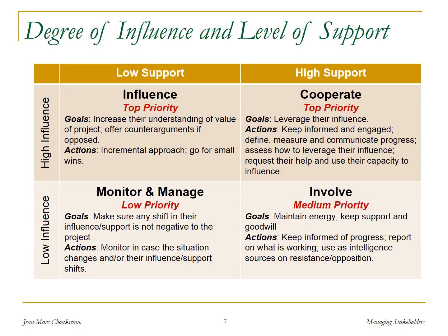Then you have the other two, the upper left and the bottom right. Let's take the upper left first. These are the most dangerous people for your project because they have a very high level of influence, lots of power in the organization, and for some reason they don't like this project, they don't support the project. Maybe partly it's because they don't support you, but mostly they don't support the project. So just like the upper right group is a top priority, so is this one.